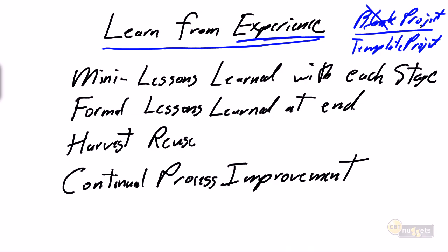Always look for something somewhere, whether it is a complete project plan, whether it is a modeled sample deliverable, whether it is a reusable piece of code, but find some way to learn from the corporate experience. And within our project, we need to do a mini lessons learned at every stage close. What worked well in this stage? What didn't work? What would we like to improve? What would we like to never do again? Life is a learning experience. Projects are learning experiences. Let's make sure that we are learning from our experiences.